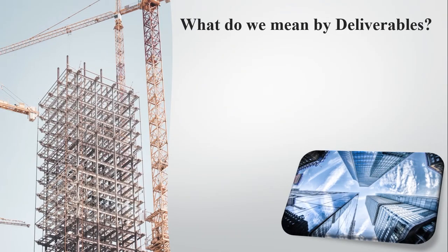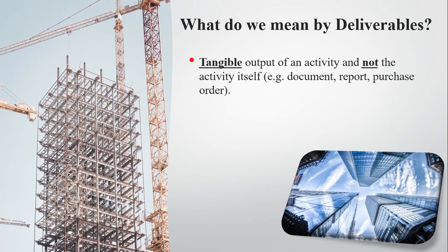So what do we mean by deliverables? When we look back at the critical path activities, and you look at your plan, you're always talking about activities and how those activities are interdependent and how they run concurrent, and the activities drive the plan, which is effectively the way you would drive any plan. But a convergence plan is structured so that you want to have something tangible that you can touch, a physical deliverable that once it has been achieved, allows the next thing to be done.